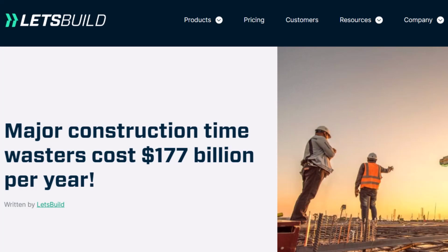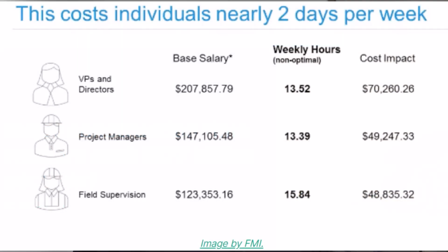One of the most difficult things we manage in the construction industry are all the plan revisions, requests for information and their responses, and all of the other details and information that needs to be communicated to the field. There are many studies that document all the time construction management personnel waste searching for the information they need, and having the wrong information is a leading cause of rework when things get built according to the wrong plan revision.